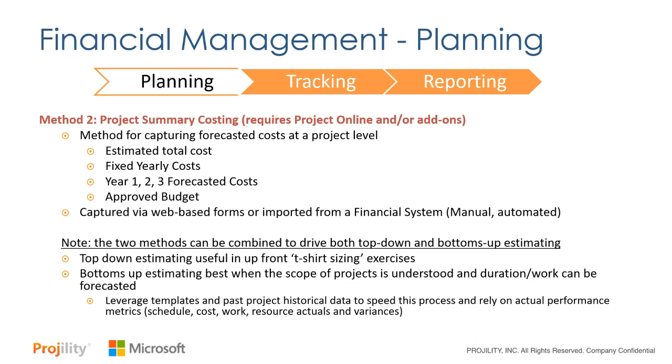What we can do also, if we do schedule-based, is we can leverage some templates. We can go back to past historical projects we've delivered successfully or not so successfully, look at the resources we used, look at the costs on those resources, look at the actual performance on that from a schedule and cost and work perspective, and use that as a basis for our planning. So what we can do is we can really combine the best of both worlds. We have to have some good discipline around scheduling. We have to have a method for our top-down planning.